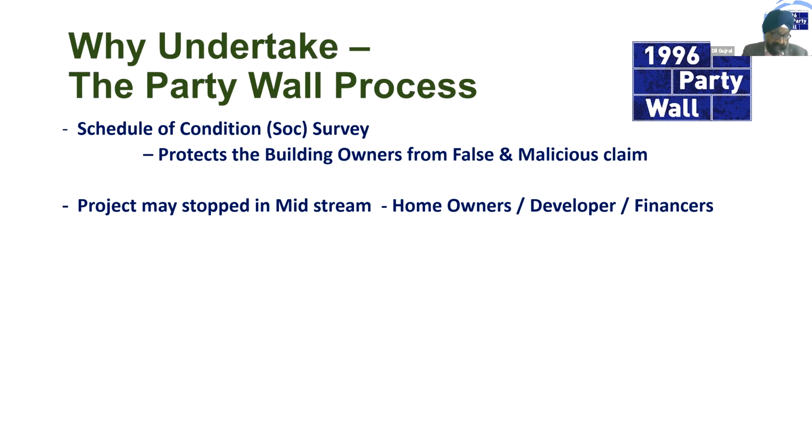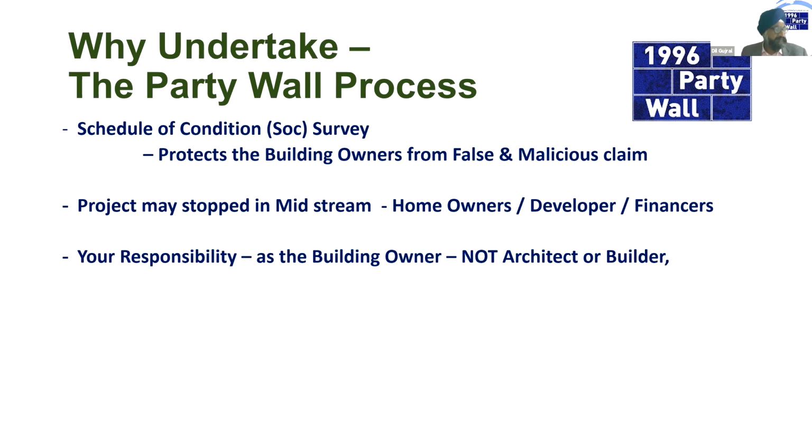We've had more than one occasion where the builders have ripped the roof off a loft conversion, and it's had to stop while we sort out the party wall elements. This could be much more serious if you're doing a commercial development where your loans become overdue and extended, beyond the development finance you've arranged. For financiers, it's not very good to not get their money back, and it creates a problem in the long-term relationship as well. So it's important for those reasons.